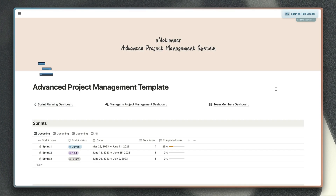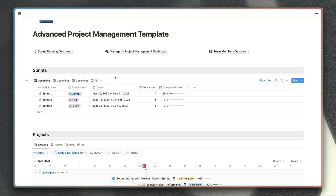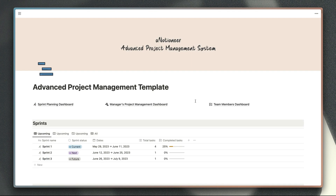So if we open up my template, at the top of the page here is the sprints database view. Just to explain sprints in case you're not so familiar — basically the idea of a sprint is it's a block of time when you plan to complete a certain number of tasks. Maybe you want to launch a new feature if you're working in an engineering team, or add a new page to your website in that time. The idea is that you fill that time with as many tasks as you know you should have the capacity to complete, so you can more easily say we're definitely going to have all of these pieces done within that time frame. If you don't complete all the tasks, you know you need to re-evaluate your process for estimating how long things will take.